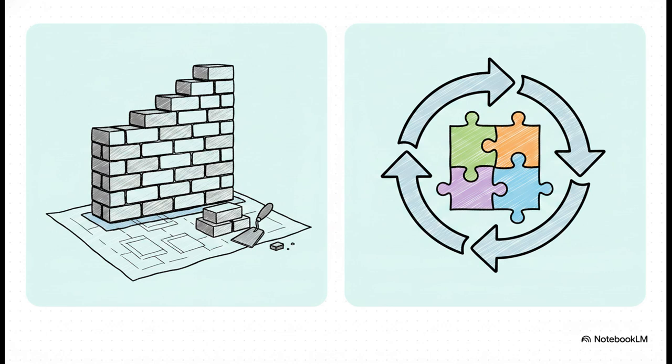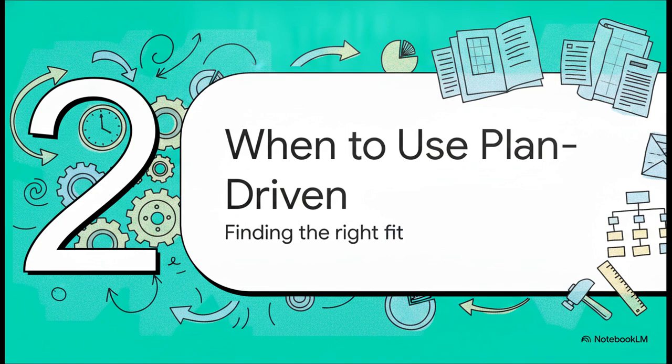Now, you really can't talk about plan-driven development without bringing up Agile development, which, as you know, we covered earlier in the course. Agile is an approach where planning is incremental. It's continuous. It intentionally delays decisions to avoid unnecessary rework, mostly because, well, requirements change, right? Plan-driven is the complete opposite. It requires detailed early commitments. It demands that we map out the system requirements completely upfront so we can design a rock-solid software architecture right out of the gate. So while Agile is super fluid and adaptable, plan-driven requires these detailed upfront blueprints before any coding happens.